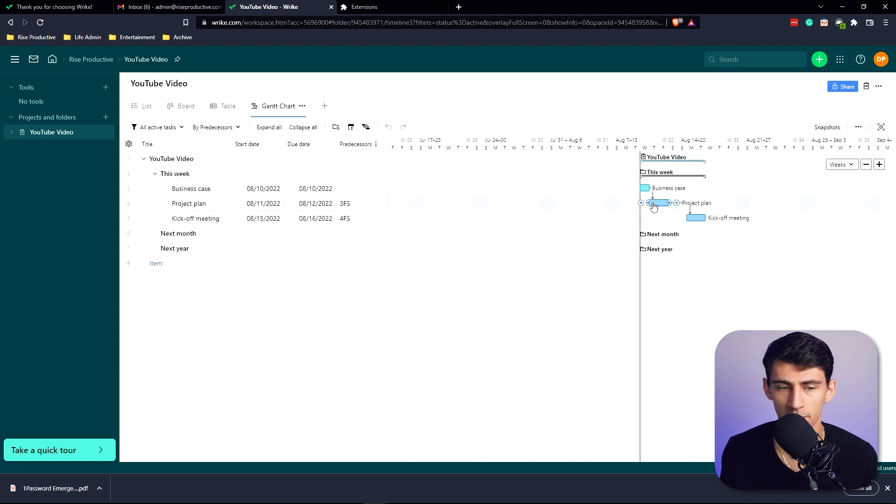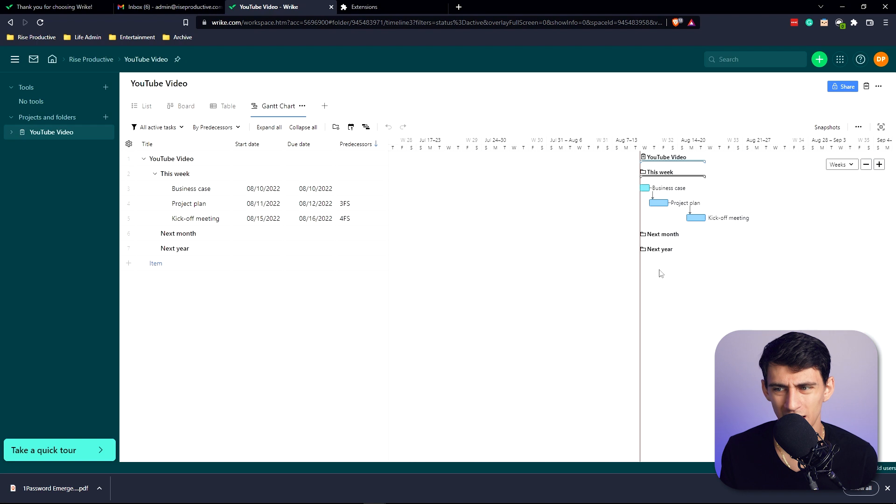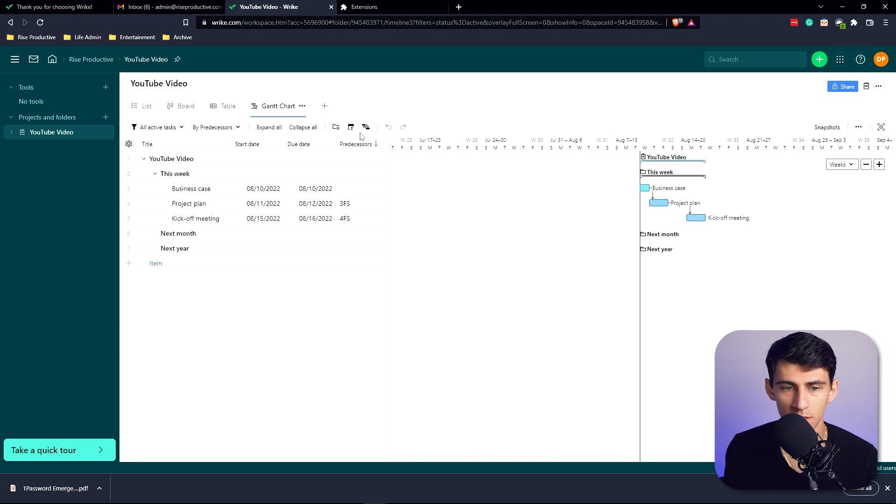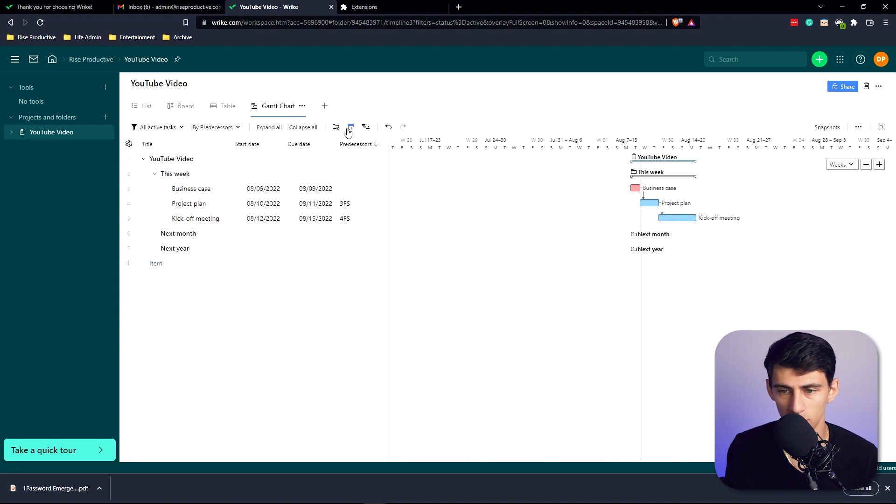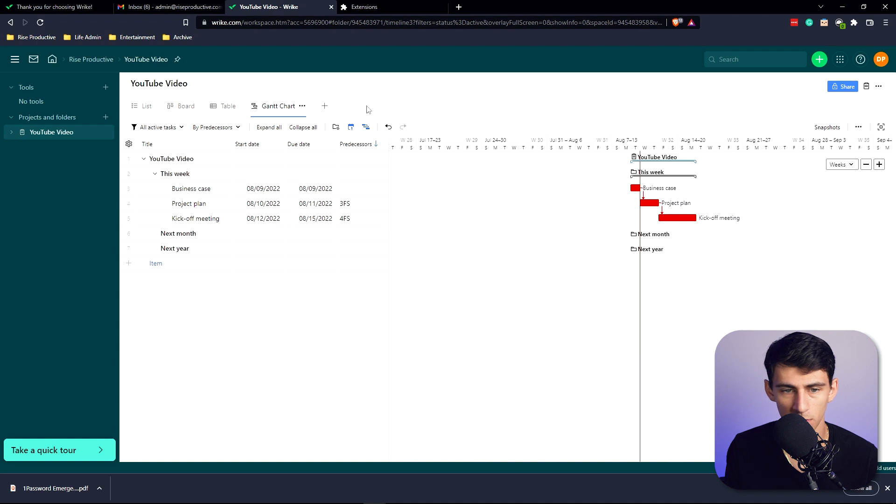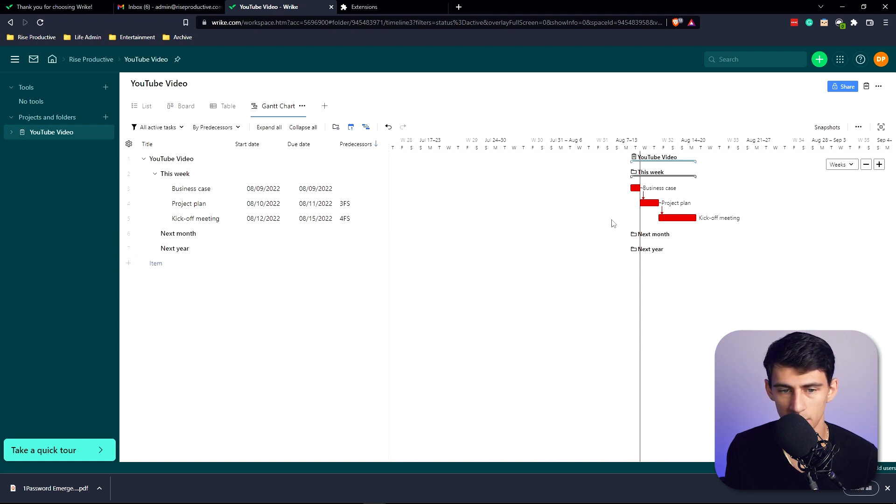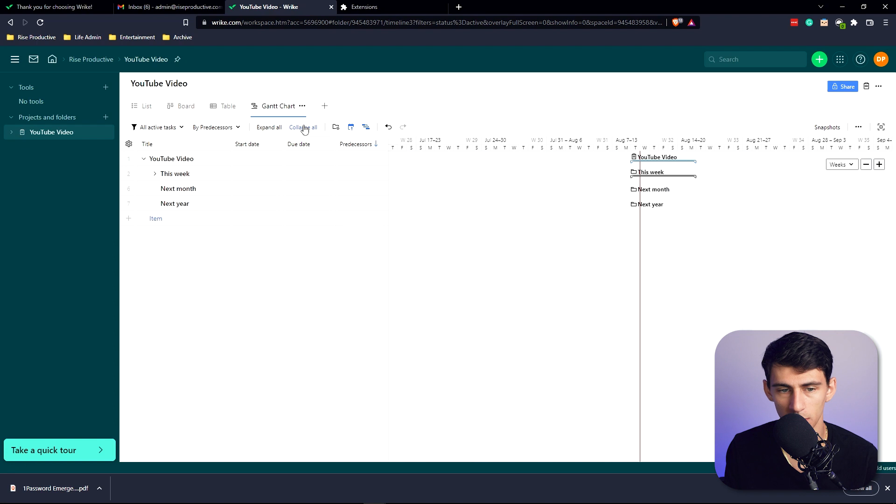Gantt chart is something that works really well for project management for companies. It's not something I use often, but some nice things you can do here is you can highlight overdue tasks - so for example, if we move this here and highlight overdue tasks, it'll change that to red. You can highlight critical path as well, and you have the option to hide empty folders.